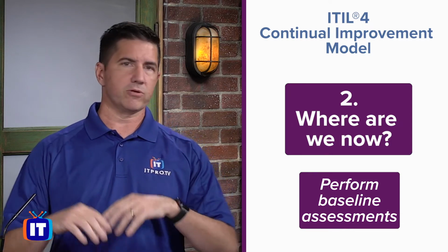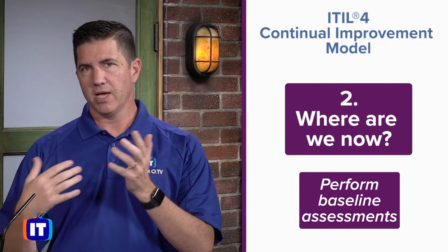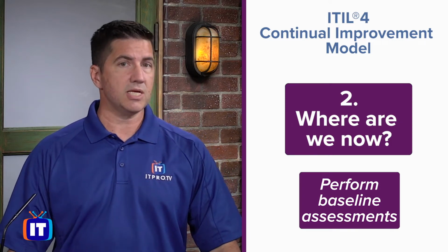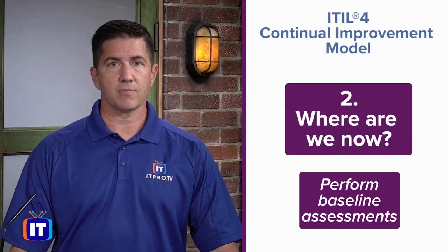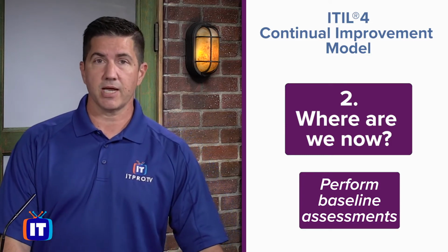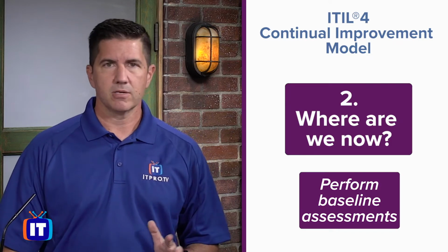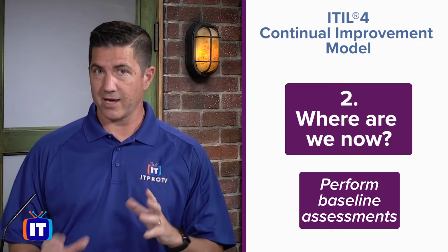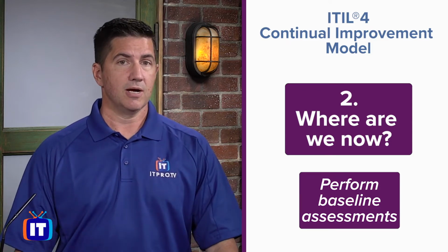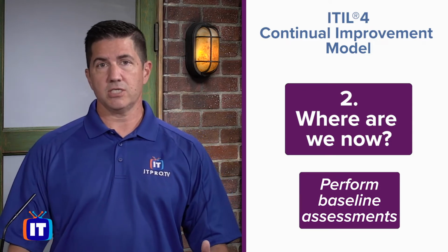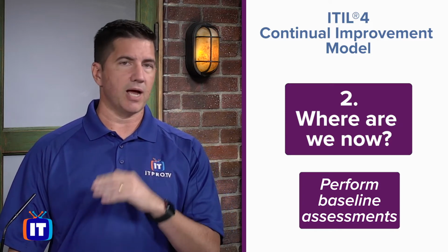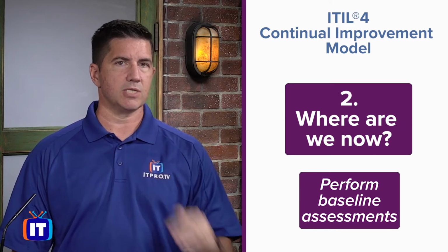So whether she already had the information or she actually did some measurements, she finds out that she is at a 68% first-time contact or first contact resolution, which is actually a pretty good setting. But she wants to get better. She wants to really get that up more, because that will then improve the customer satisfaction of Acme Widget. So she says, all right, I know where I am right now. I have my baseline. I'm at 68% FCR.